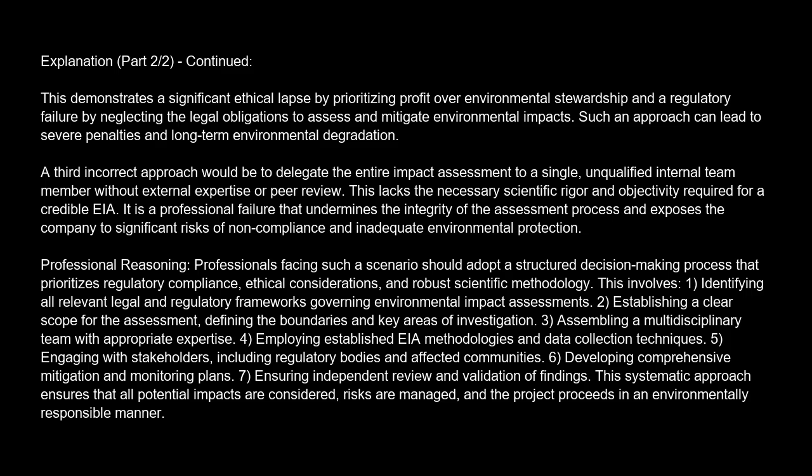Professional reasoning. Professionals facing such a scenario should adopt a structured decision-making process that prioritizes regulatory compliance, ethical consideration, and robust scientific methodology. This involves 1. Identifying all relevant legal and regulatory frameworks governing environmental impact assessments. 2. Establishing a clear scope for the assessment, defining the boundaries and key areas of investigation. 3. Assembling a multidisciplinary team with appropriate expertise. 4. Employing established EIA methodologies and data collection techniques.